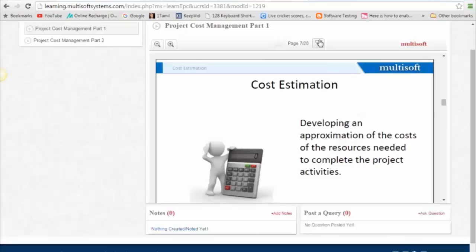In a cost management plan, the unit of measurement could be in terms of hours also, but indirectly it will be related to the monetary costs. Usually billing happens in man hours, so sometimes the unit of measurement is in hours also, staff hours or head count and hours. But ultimately it leads to an expense in terms of monetary expense.